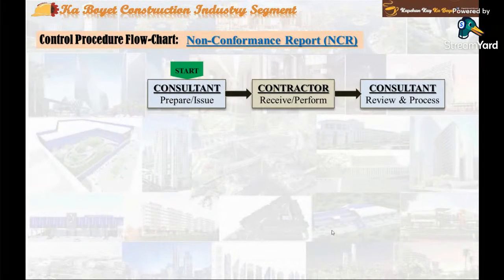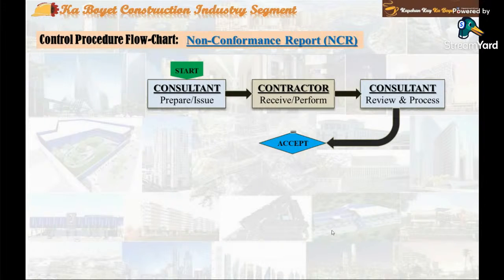The consultant then prepares a disposition as agreed during the meeting. This is the so-called owner's disposition. If rejected, the consultant returns the submitted contractor disposition to the contractor to make the necessary correction or modification as agreed on the meeting and resubmit the proposed contractor disposition for approval.